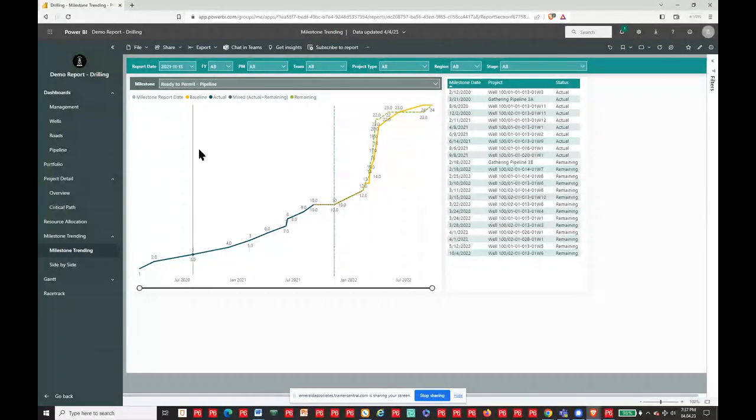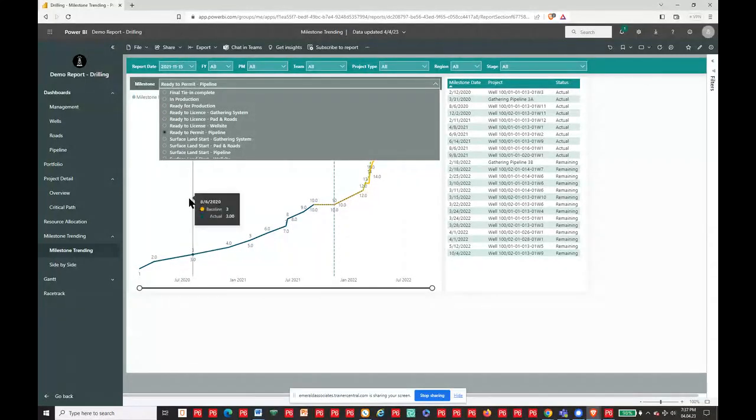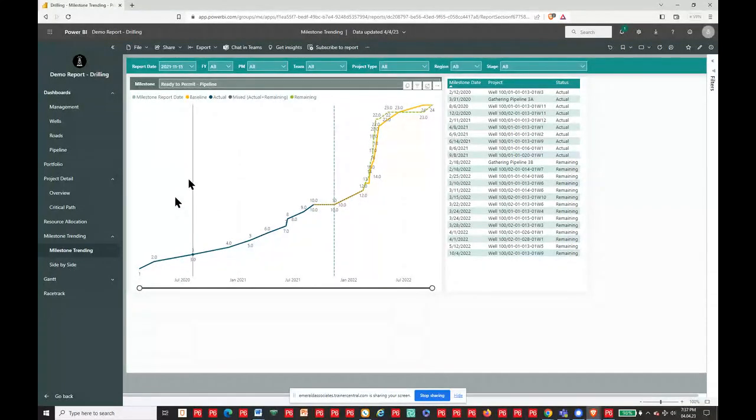Now, in these projects, the milestones have codes on them. So we have what we refer to as a type of milestone. Again, these are drilling milestone types, but I've dealt with turnaround milestones that have different names, and you still have a number of different turnaround milestones. So each type of project would have different codes on the milestones, but you're usually still looking at grouping them together and reporting on them.